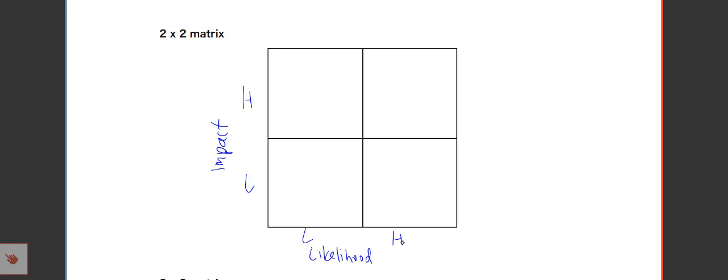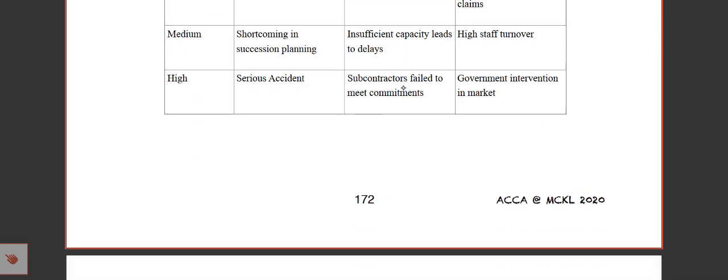So we generally say that there are risks that are low impact, low likelihood, high impact, high likelihood, and vice versa. But this kind of risk assessment, the way you tabulate the risk, will not be very helpful. It is like I'm telling you that risk A is high impact, high likelihood. Risk B is high impact, high likelihood. Now, you probably thought that they are equally significant, but maybe risk A is here, but risk B is here. So the position in the risk map will give us a better understanding of how significant the risk can be.